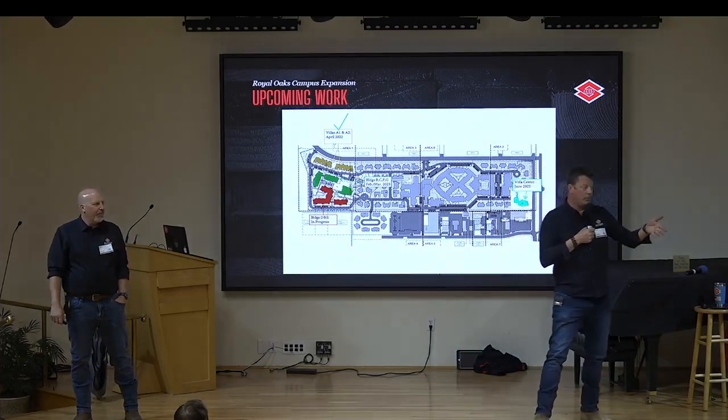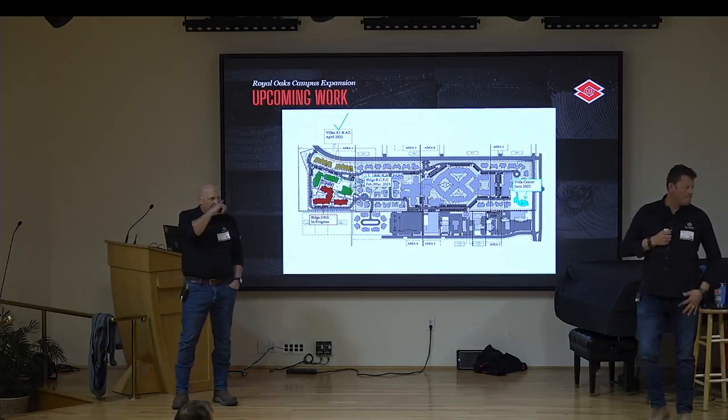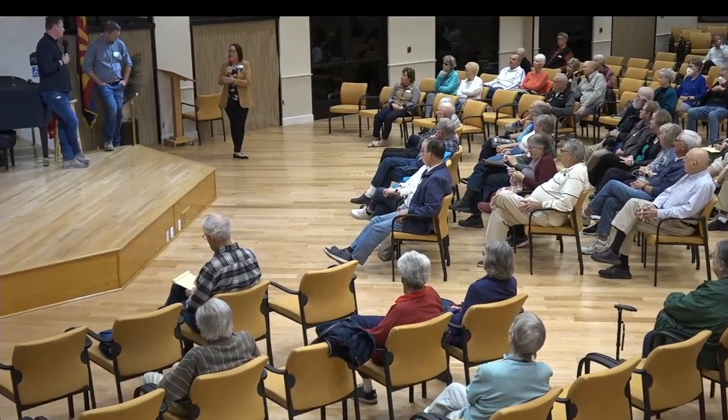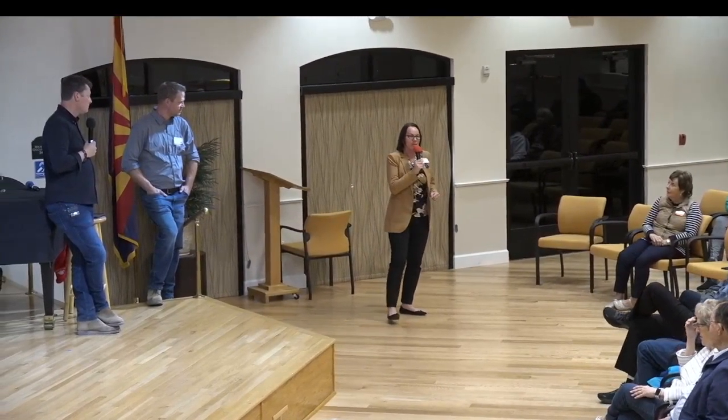So I will unfortunately put Gretchen on the spot to find out what their ramp up time is for facilities. Sure, and it's going to take Mark and his team a while to stock the kitchens and the storage rooms, and then also bring the staff over and train them on all the equipment. But like Kelly spoke earlier about the mechanical equipment at the Vita Center, he just got notice that it's going to be delayed. I just got notice that the tables in the dining room are going to be delayed. So it's really hard to cook out of that pizza oven and serve you pizza unless you want it to go only. So we're experiencing some delays just like everybody else is. We're hoping early May at this point, early May. The delay on the tables is not until the last week of April.